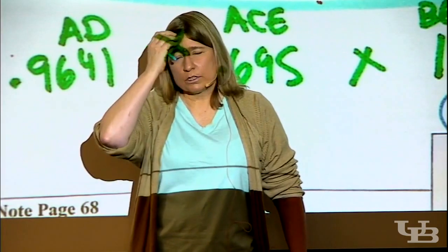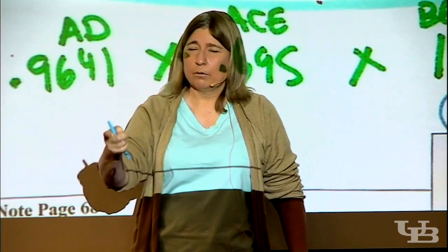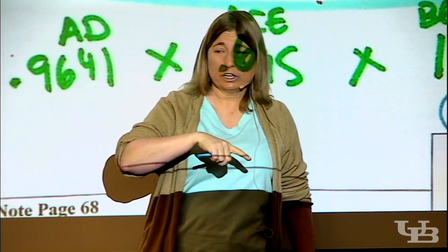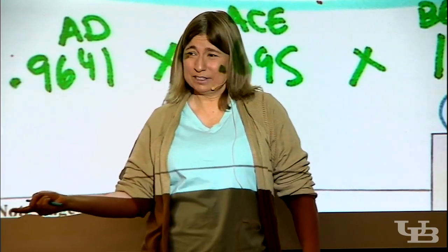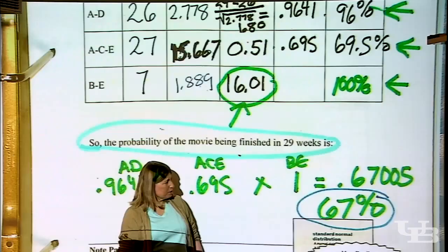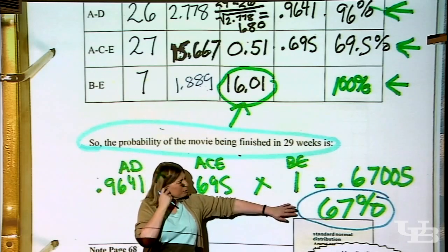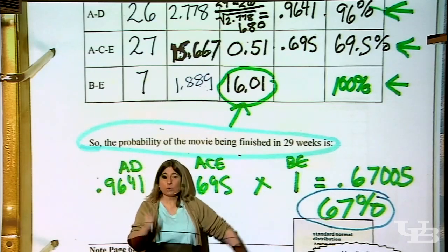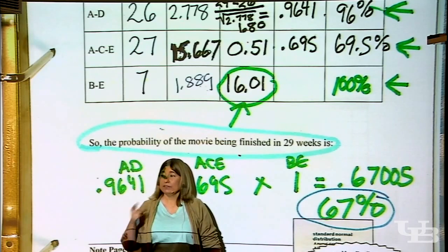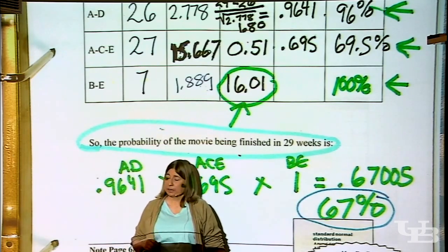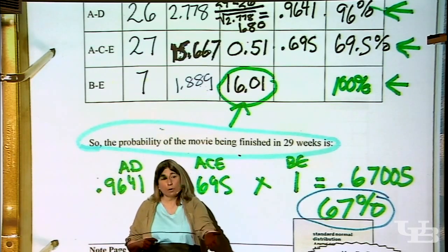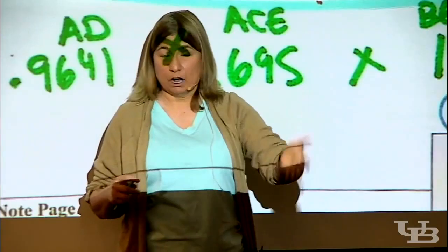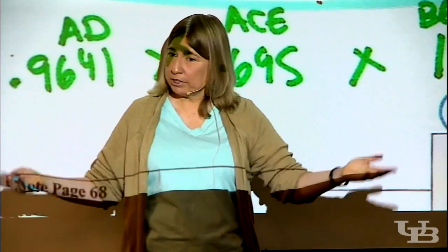Which means, what's the probability it'll take more than that? What's the probability that, if we agree to late penalties, we'll be paying a late penalty? It's still pretty substantial, right? We only have a 2/3 chance of making that 29-week deadline. We'd have even less if we reported the expected completion time of the project. And we have a 1/3 chance, basically, of not making even that deadline that's padded by 2 weeks.